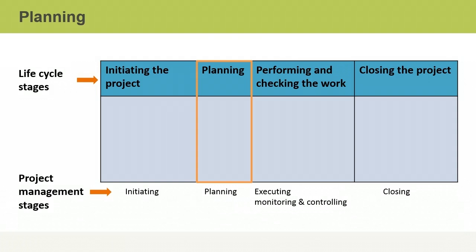Some significant items are identified or created during the planning stage. They include the project management plan, scope requirements, work breakdown structure, the schedule baseline including activities, budget, resource requirements, detailed risks, communication plan, procurement plan, and the change management plan.